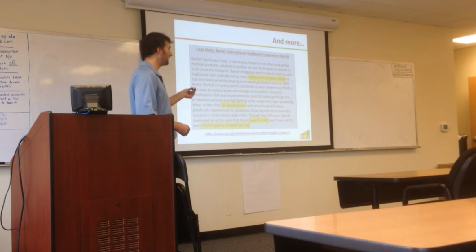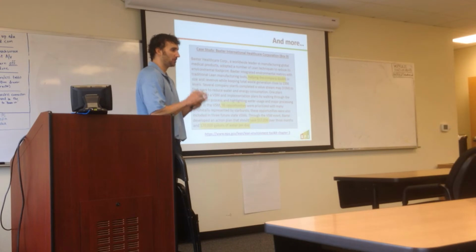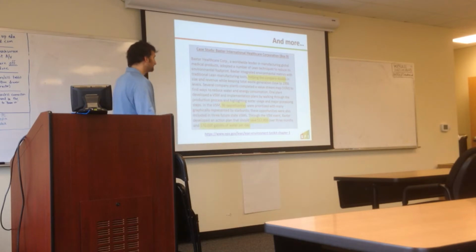So usually we try to make the action plan have follow-on smaller events, Kaizen events, or short 1-day, 2-day types of events, where we get everybody together and we're going to knock this out, versus trying to do one hour a meeting spread out over time. It just takes too long.